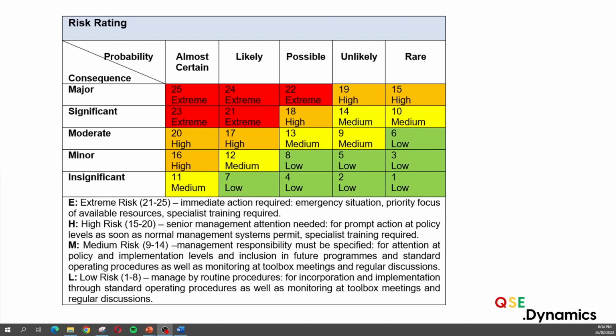And now just lastly is an example that is more in my preference. Again, the keyword is preference, so that's not saying that this is perfect. There's all sorts of reasons why you'd want to do it differently, but I do like this for a number of reasons. So we can see that the numbering system, each different classification has a different number. So there is a difference between a 12 medium and a 13 medium. The benefit of this is as soon as you see that risk score being used, you know exactly what the user has picked, which I think is nice.